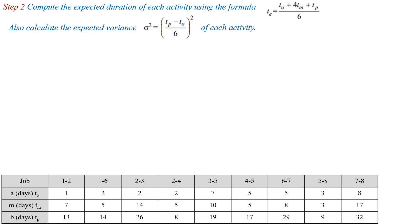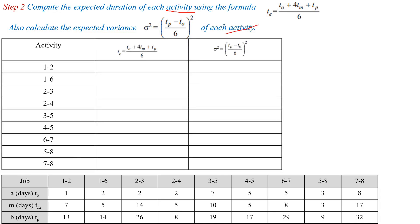The second step is to compute the expected duration of each activity using the formula: TE = (T0 + 4TM + TP) / 6. Also calculate the expected variance, sigma squared = ((TP - T0) / 6) squared, for each activity. We need to determine TE and sigma squared for all activities in a table.